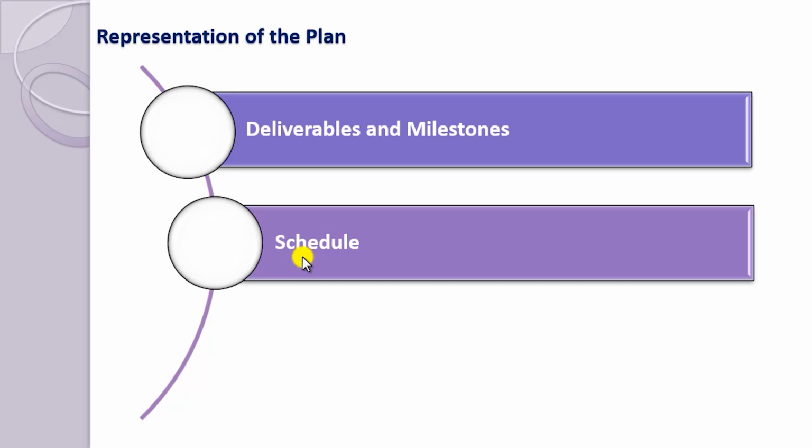It never happens. So the client also keeps on changing the requirements, and sometimes our understanding also changes. We might have thought that task A will take 10 days, but it could be different. So there will always be a scope of re-estimation. That's why in certain terminologies like CMMI and certain methodologies, it is termed as baseline, and the version keeps on changing.